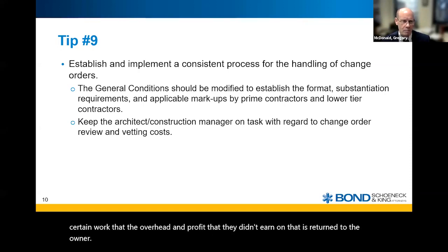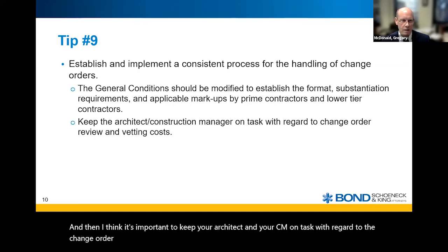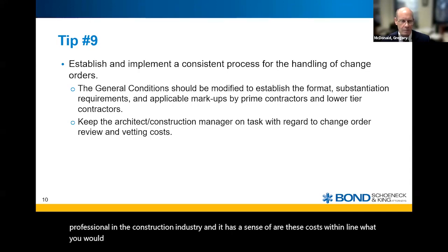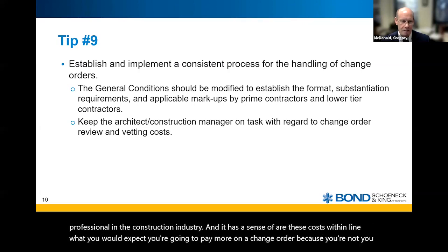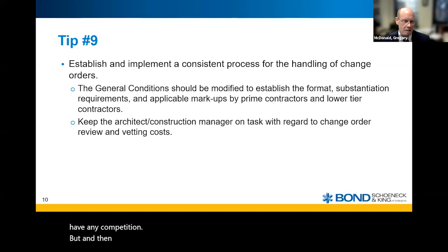And then, I think it's important to keep your architect and your CM on task with regard to the change order review and vetting the cost. Your construction manager is obviously a professional in the construction industry, and has a sense of whether these costs are within line of what you would expect. You're going to pay more on a change order because you don't have any competition. And then whether it truly is a change.